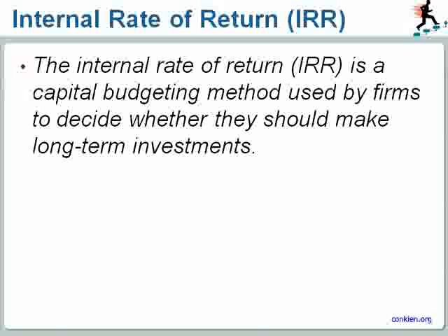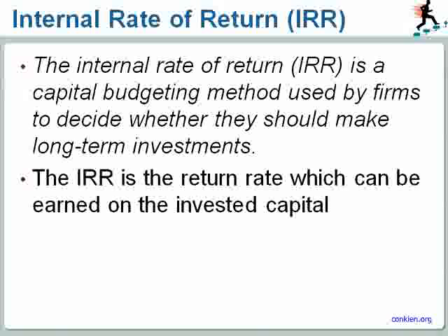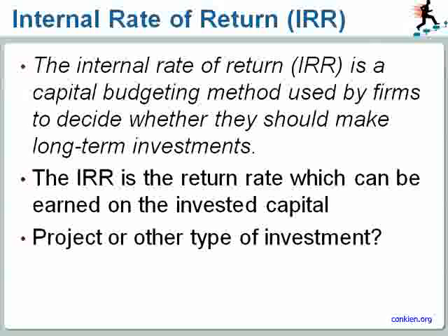The IRR is the rate, the return rate, which can be earned on the invested capital. That is to say, the yield that you get on the investment. Therefore, a project is a good investment proposition if the IRR is greater than the rate of interest that could be earned by alternative investments. That'll help you make that decision.